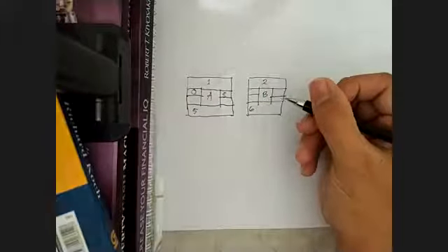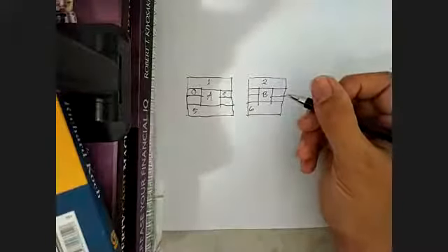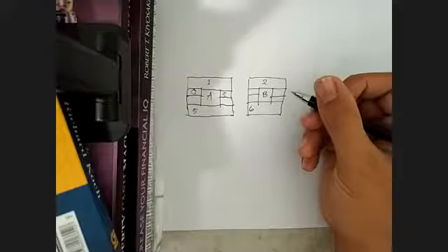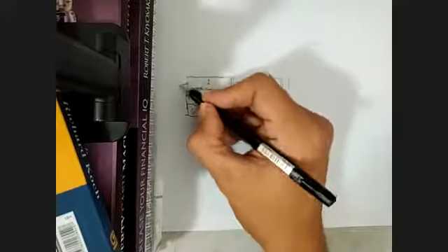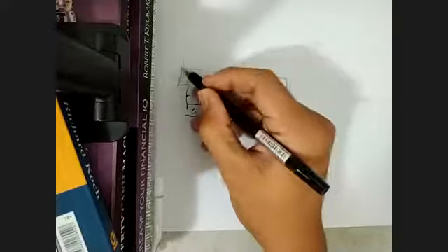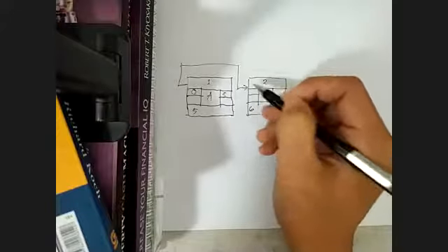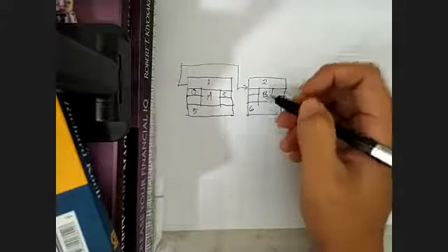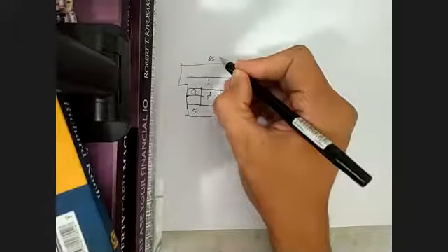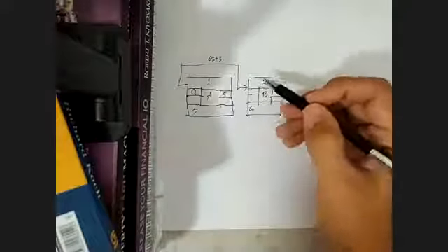First of all, we have to understand that the activity P has the predecessor start to start between activity number 1 and activity number 2, which means the arrow should come from the left side of the box A, and the arrow should come to the left side of B. And we can write down the notation SS that represents start to start with the lag of 3. Okay. So SS plus 3.